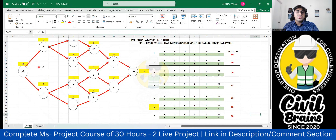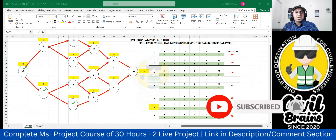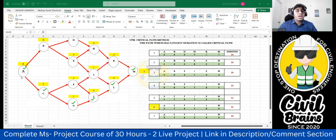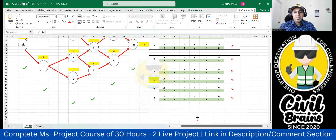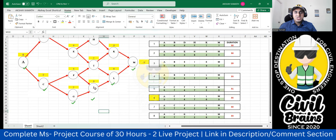The last path: A → C → G → J → L → M. From C, I go to G, then J, then L, then M. Durations: A = 8, C = 7, G = 7, J = 2, L = 6, M = 3. Total: 8 + 7 + 7 + 2 + 6 + 3 = 33 days.